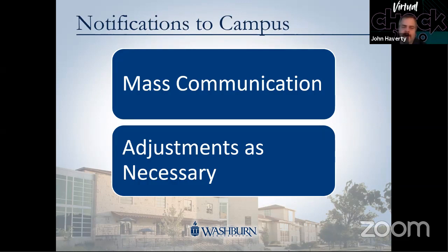We would oftentimes show up in an area ready to install, and the people would say, wait, I don't have time for this. Can you come back tomorrow? We do that to a certain extent, but only if we're going to be in that area. If we were going to be in Henderson doing installs and they wanted to delay it for a week because they have finals or whatever was coming up, we would work with them a little bit. But if they kept putting us off, finally we tell them, no, you're going to get your computer at the end of the process. We're going to leave this department, this building, and move elsewhere so we can continue getting through our list of computers. We can't just keep rescheduling these with you.